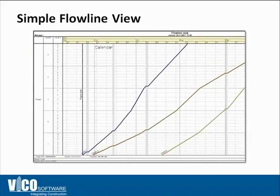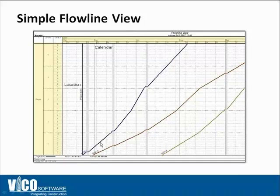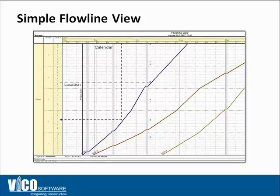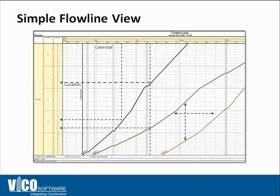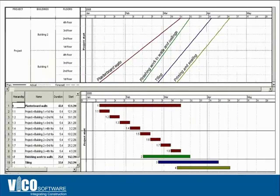In the Flowline view, the top shows a calendar and the left side shows a location — in this case, five floors. You can see how crews pass through these locations, represented by a simple line. It's easy to see where certain crews are at any point in time, how far apart they are in terms of locations, and the time and location lag between two crews. You can also analyze productivity and see which areas are being utilized or underutilized.